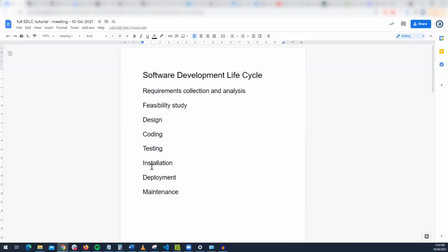But that's when you choose your methodology of development, when you're planning, and really what dictates that is when you're collecting requirements, you're trying to figure out what the scope of this project is. How big is this project? How complex is this project? If it's simple, then we probably don't even need agile, right? But if it's really, really complicated and there are a lot of requirements, and it keeps updating, and it's a dynamic project, and so on and so forth, then you're going to need to use agile.